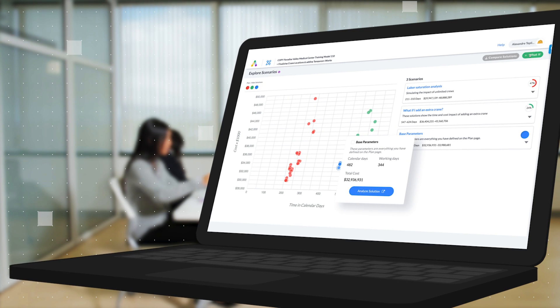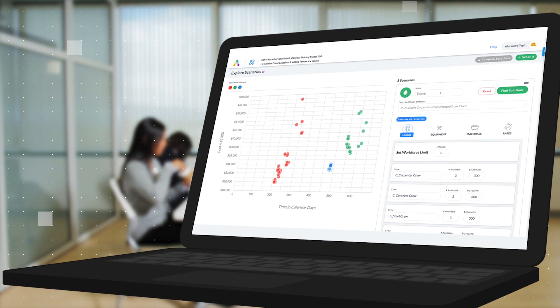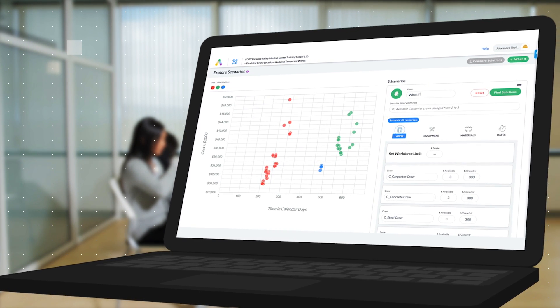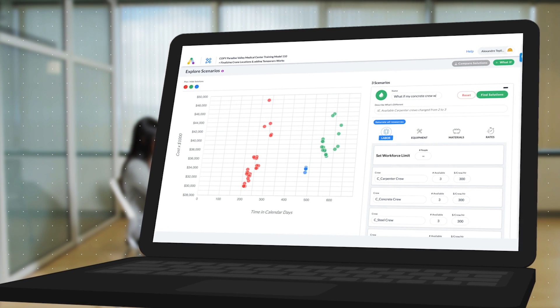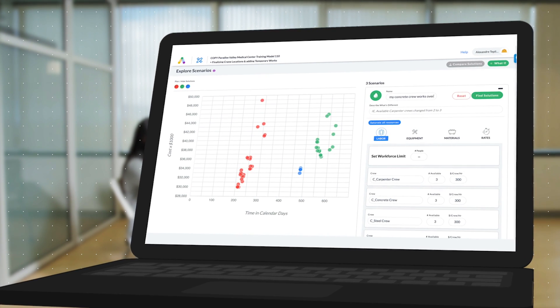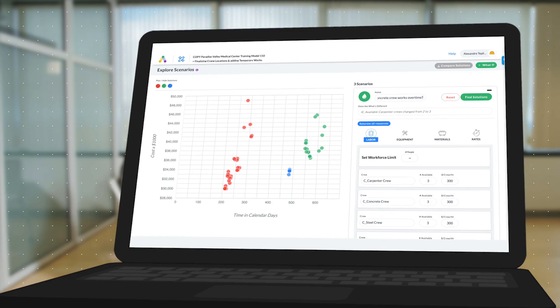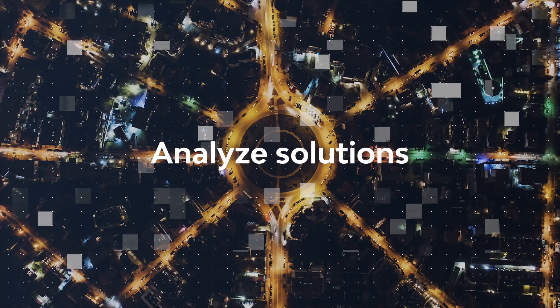What's more, with Alice, you can easily quantify the cost and time impact of different decisions. For example, what if I were to add another crane, or should my concrete crew work overtime?